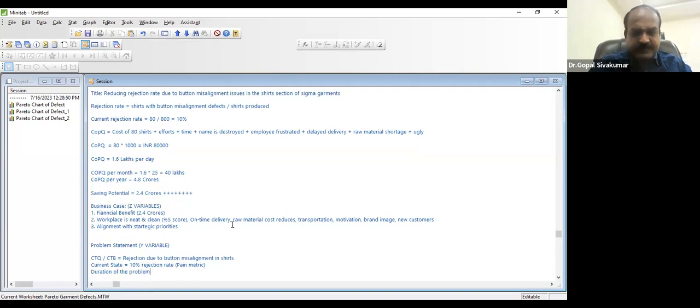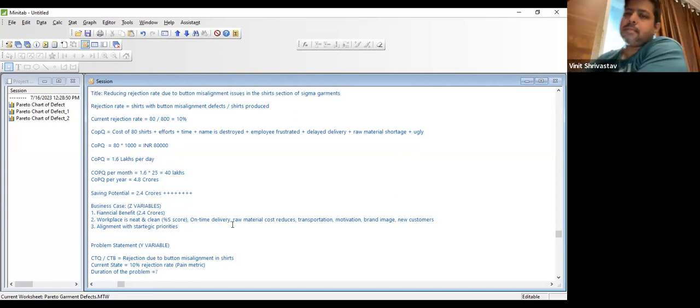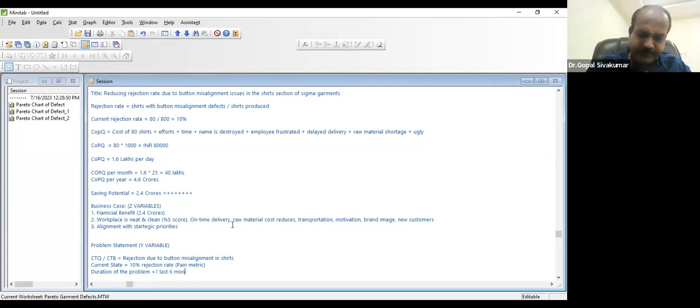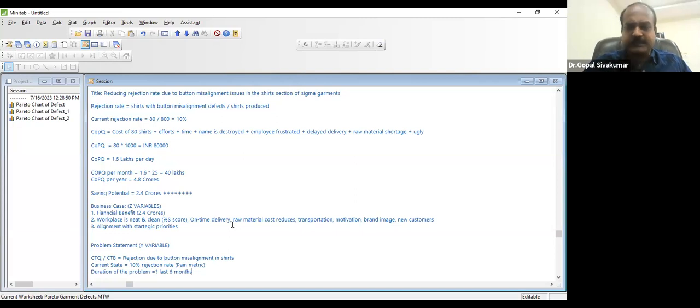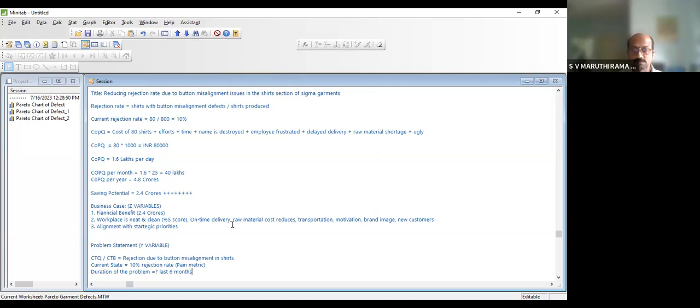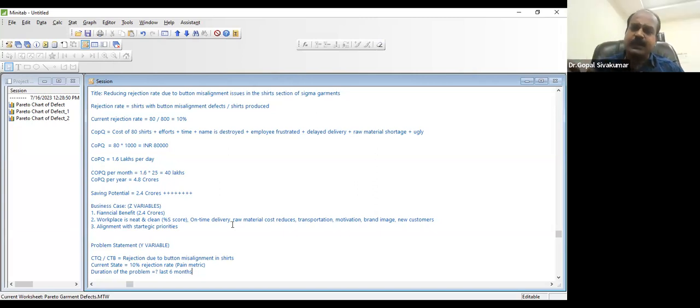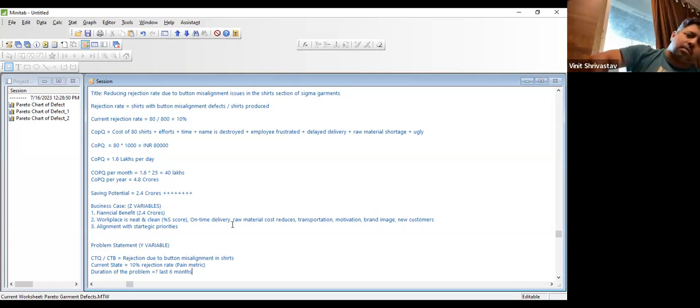And then try to add on. What is this? Duration of the problem. How long is this happening? Yes, last 6 months. Very painful, isn't it? So it is communicating the pain, but in just 2 lines. Straight to the point and clearly communicating the exact pain. To whom? Top management, the project sponsor, the champion. They will try to understand your project in less than 5 minutes. That's why we have to be crystal clear, with bullet points.